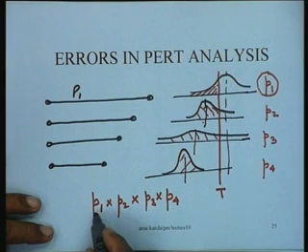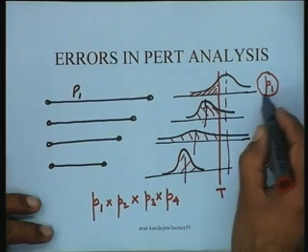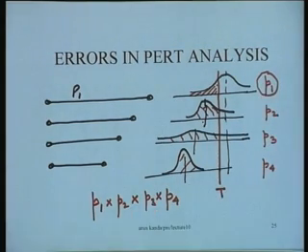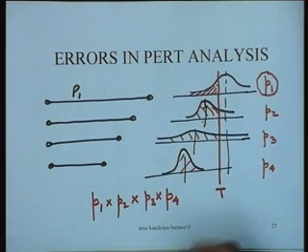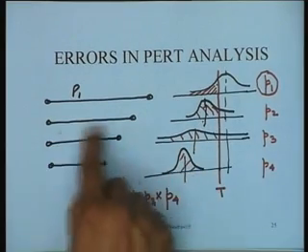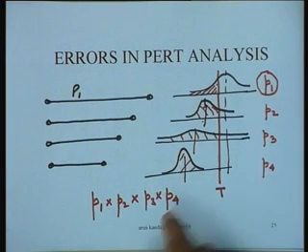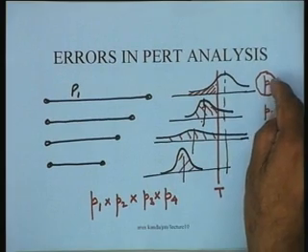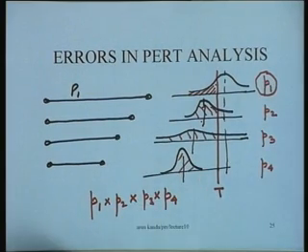which actually means that this probability will be smaller than this probability, which goes to prove that the estimates you obtain by PERT are going to be optimistic. It is going to give you a higher probability, meaning more optimistic estimates. The higher probability it is giving you, actually the true probability is lower, just as I mentioned here. But these paths are not independent, so there would be some correlations coming in, but this is like a lower bound of the probability. So the real probability would be between these values in a real-life situation.